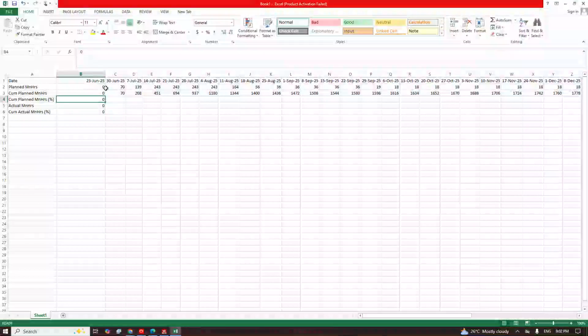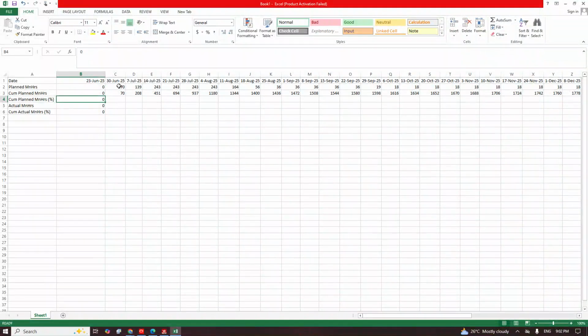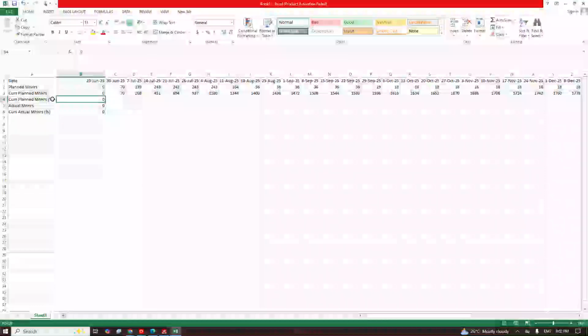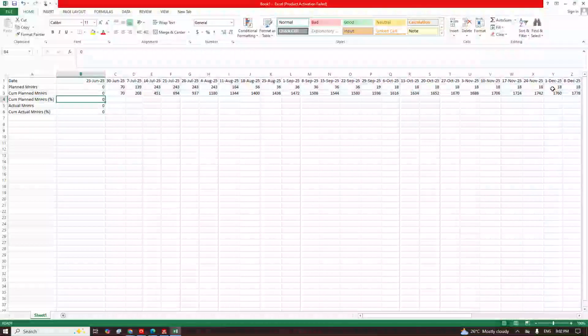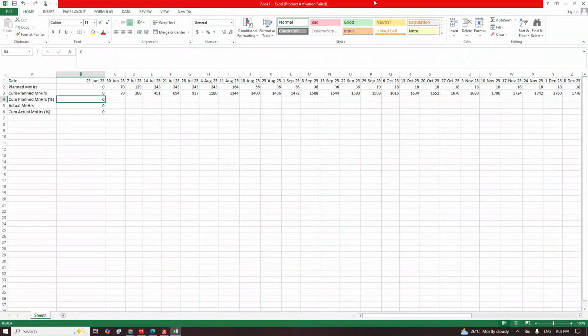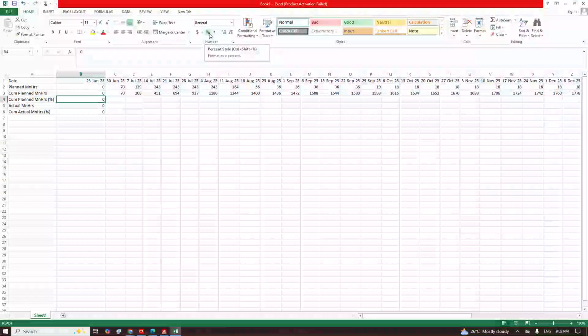I will divide the cumulative plan man hour by the cumulative man hour. Okay, sorry. I will divide the cumulative man hour by the total of the plan man hour. Then I will now convert it to percent by just clicking on this percentage sign. Then I'll make it to two decimal points. That's all.